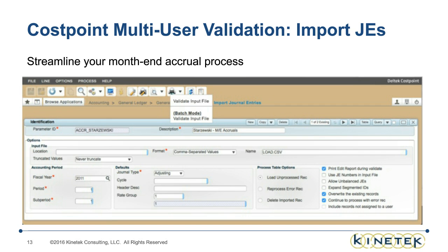As a program finance professional, you end up establishing relationships with the subcontractors that work in your programs. But then you also need to know what other costs are coming through. If you have any other material costs coming through, for materials, for equipment, for whatever else it is, you need to make sure that you do the analysis to see if those costs were already booked, and if not, do the accrual as necessary. So that kind of tangentially gets roped into the whole budgeting and forecasting process.